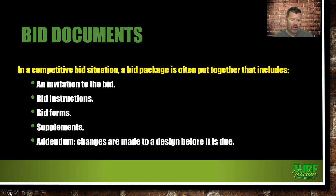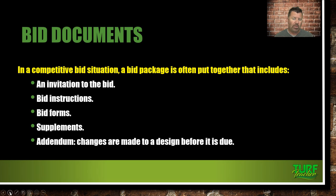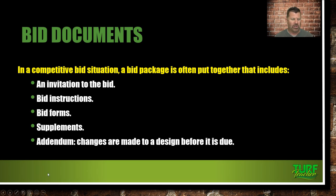You're going to see examples of the bid forms, a copy of a change order, and supplements included in the contract. You'll also see addendum changes made before the design is due — for instance, if the landscape architect had to swap red crepe myrtles for pink ones because the owner requested it. You want to see the original design and those changes to understand where the owner's thinking is and what's going on with the project.